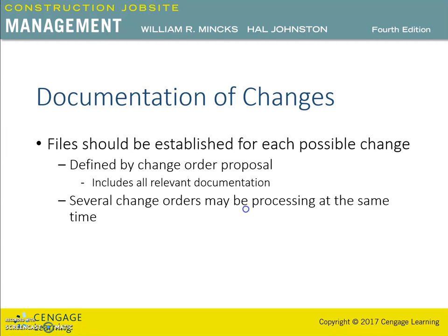documentation to the change, including photographs, daily reports, cost records, subcontractor correspondence, excerpts from the meeting minutes, correspondence with the architect or owner, drawings, details, applicable excerpts from the specification and contract, and other applicable information.